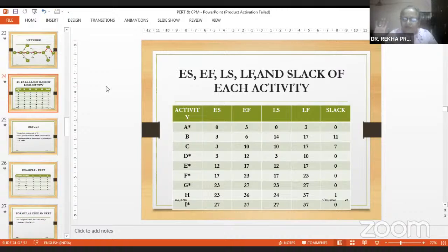He can do whatever he feels like during that 1 hour from 8 to 9 p.m. But the other finishes all his work by 9 p.m. So he has no relaxation. So he has no slack. That is the difference. So you identify the critical path, the path which has no slack. So I have identified that A, D, E, F, G, and I, because the slack is 0.